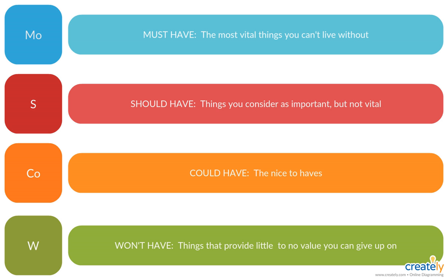Yeah. That's where the art comes in, the art of the possible. The main mechanism we use for that, something I think everybody involved in Scrum projects in the past is familiar with, is the product backlog. That's the list of the requirements we need to fulfill in order to say we're done with this project. And we use that product backlog in a very particular way. We call it ordering the priorities, and we do it on a continuous basis with our customers as we go through the project.